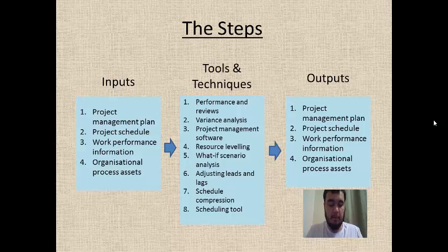The last and final step of control scheduling is known as the output section. Here, after the proposed alteration has been made to ensure continual progress, all of the official documents and reports must be updated to inform the rest of the team and/or company of the approved changes. This is also useful when showing the client or board of directors if called upon, as they may not approve of the ethic work towards the particular issue, but by showcasing the documentation and the reasoning, they will potentially find it acceptable. In these documents, it is helpful to state why a variance has been made to the project and the other lessons learned from the problem resolution.